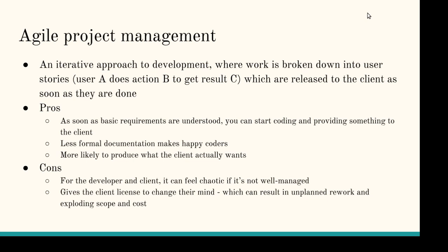Yes, Jai. Yeah, my father used to own a construction company. So what they did, there was a certain amount of weeks before they started, during which the customer could come and say, oh no, we've thought about this, we want to do this instead. But after that time limit, say after like 4 weeks, they charge to change it because they've already started. So it will cost them a lot more money to do it. Yeah. So I think that would also be a good way. It could be.